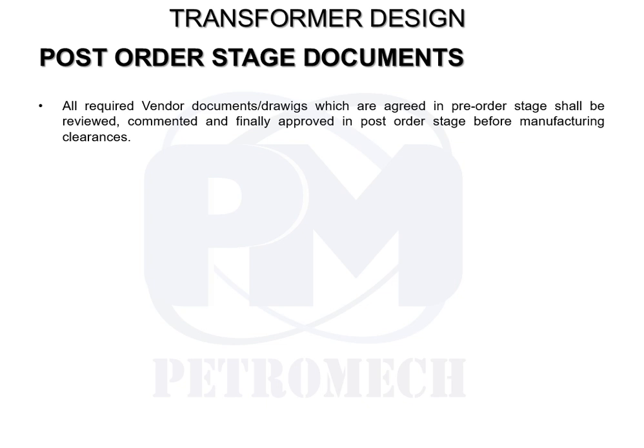So we have to be very clear with respect to the project timelines, as well as clearing all the doubts and communicating with the vendors so that the manufacturing clearance is provided on time, and accordingly the vendor can take the lead time for the manufacturing and finally the shipment for delivery of that equipment at the site. So from the project lifecycle perspective, we have to look at the schedule for when we need to finally give the manufacturing clearance to the vendor, so that the timelines of the schedule for the project are being met.